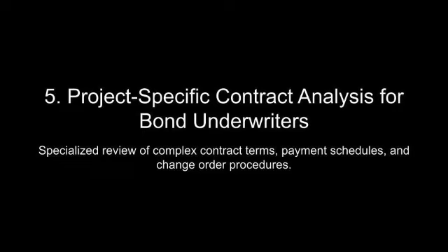Red flags in milestone-based payment structures. Milestone-based payment structures, while ostensibly designed to ensure accountability, are fraught with potential pitfalls. One critical issue arises from poorly defined milestones, where the scope of completion is ambiguous or subjective. In such cases, contractors and project owners may dispute whether milestones have been met, resulting in payment delays that can disrupt project timelines and cash flow.